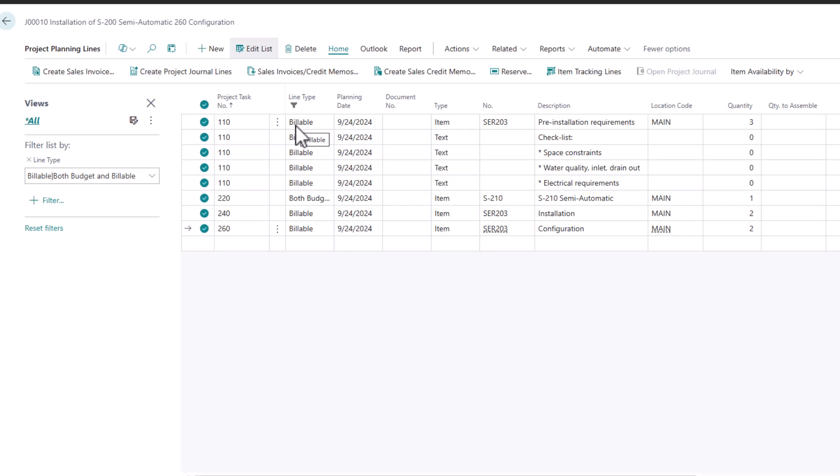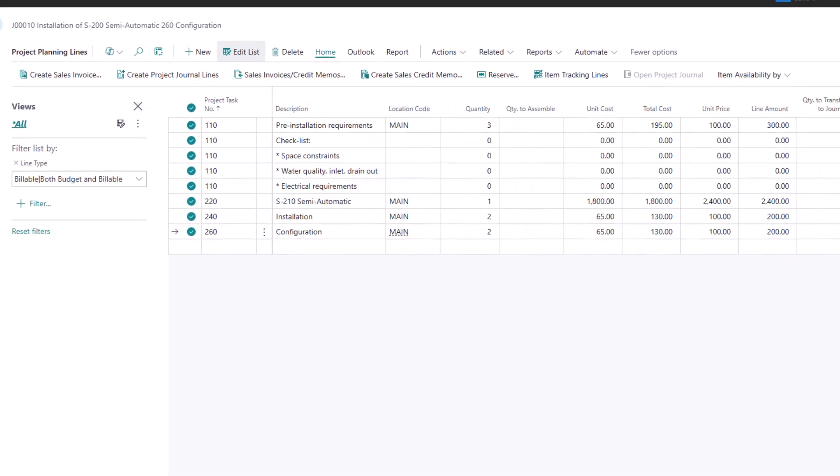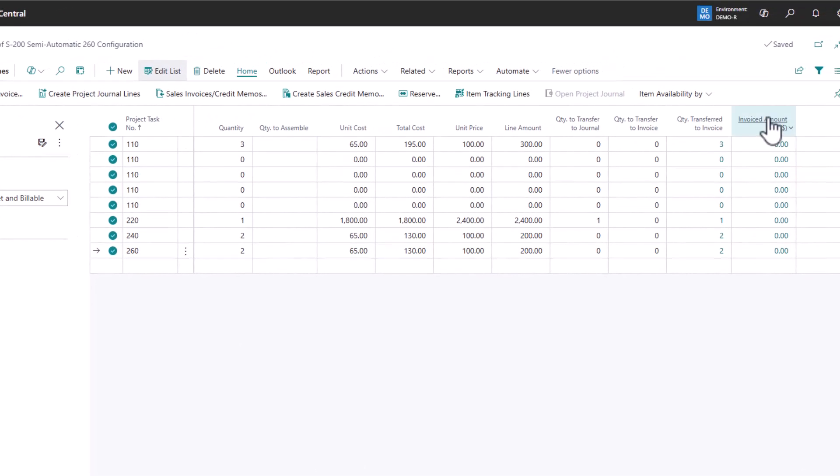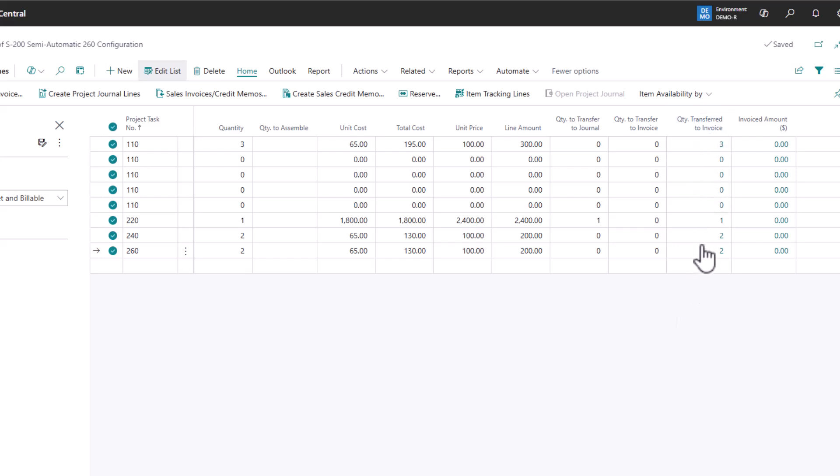And because it knows the jobs are linked to different customers, it will create invoices for each of those customers across all of your projects. So it's a great way to simply highlight everything and then create sales invoice. The system will track it. So there is an invoice amount and a quantity that's been transferred to an invoice. So you don't have to worry about duplicate billing through your project because the system is tracking all of that information.